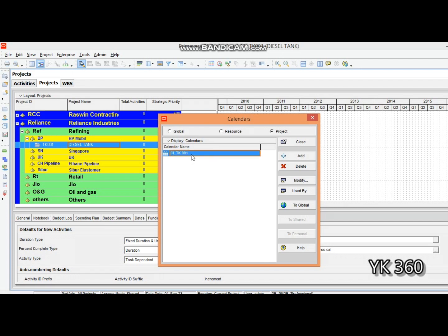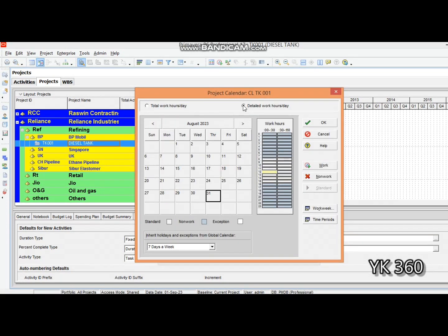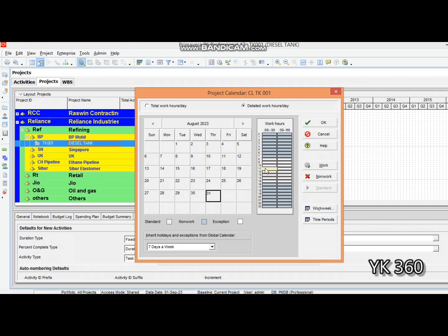Now we need to do some modification for this calendar. We need to change the working hours. Click Modify, then click Detailed Work Hours Per Day. As per our plan from management, we plan to start our work from 6 o'clock until 11 o'clock, 11 to 12 is our break time, then 12 to 3 o'clock is working time - 8 hours a day.